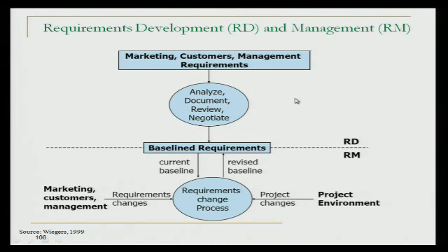Does that make sense, what we're trying to do here, what this is trying to show? So whether that baseline is formal, you know what, I'm going to move it to another level of configuration management, the requirements document, or something less formal, you should communicate a point at which any further change is going to be managed more aggressively.